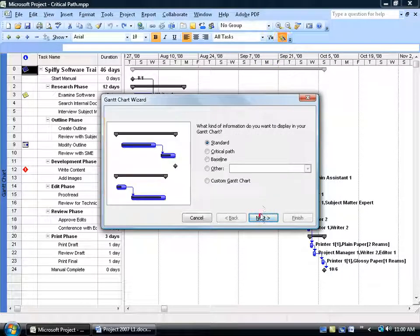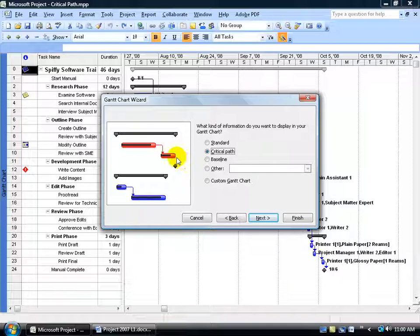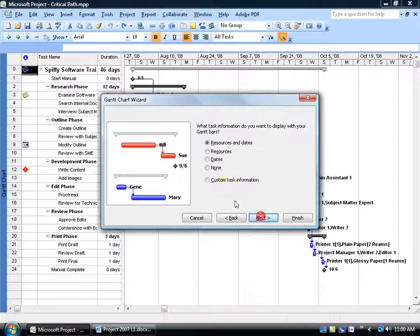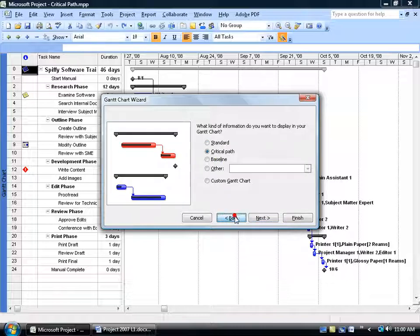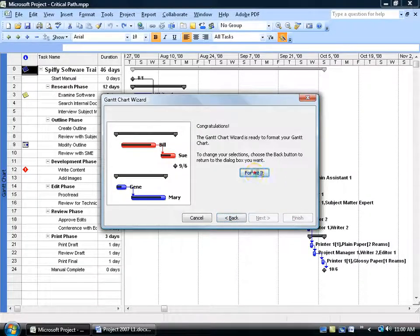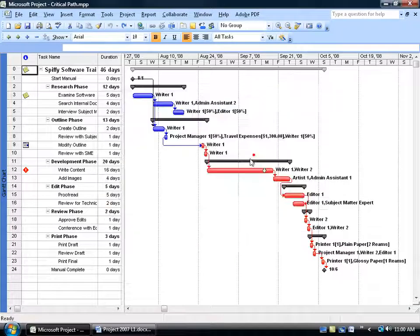It's really simple. Click Next and it asks what kind of information you want to format or display. Select critical path — by default it will be shown in red. You can click Next and go through the other steps, but I'll click Back. Critical path is good enough for me. I'll click Finish, Format It, and Exit.